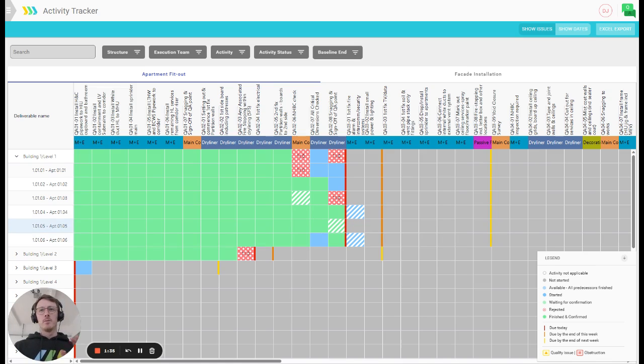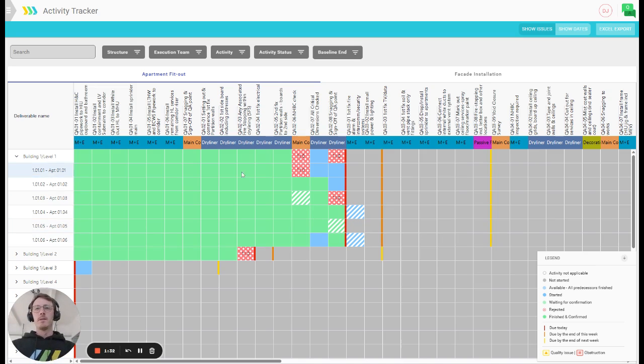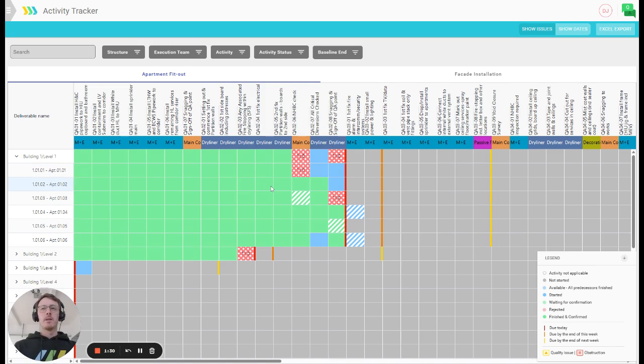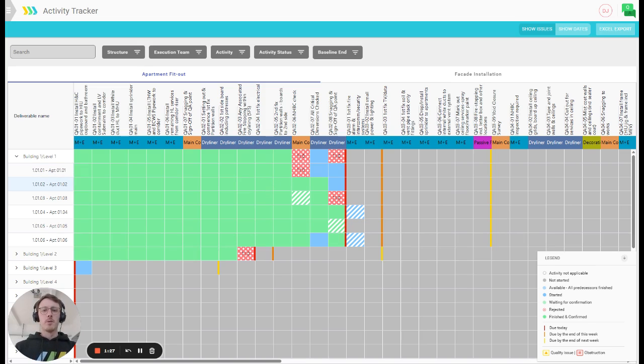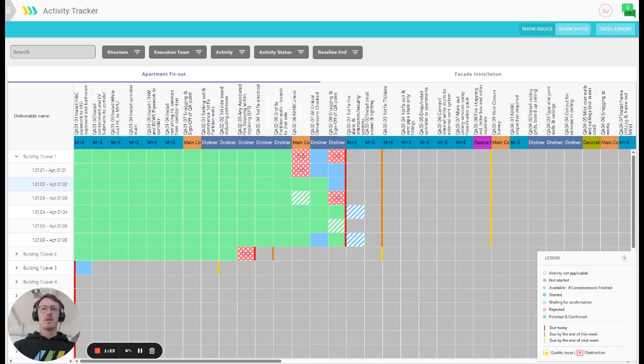That means you will not update this manually on your own. This is auto-updated whenever somebody of the team reported progress from site using the mobile application. In most cases, that progress report is then actually also confirmed by management, so you can really trust the data that you see here.